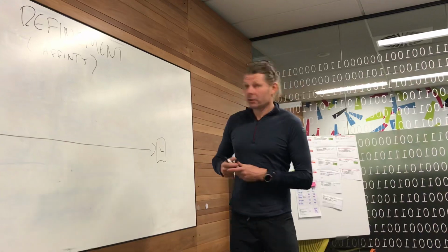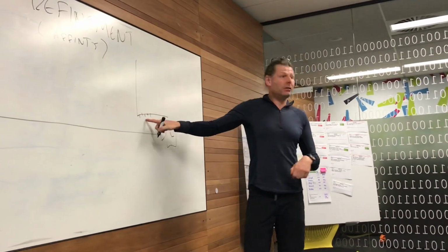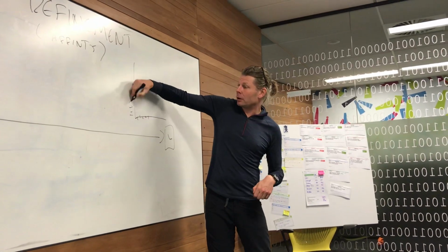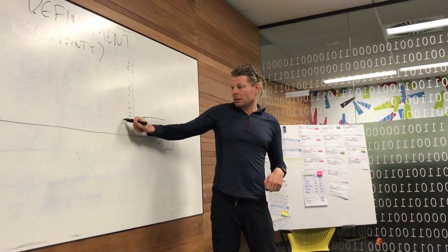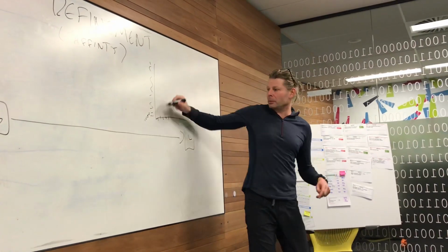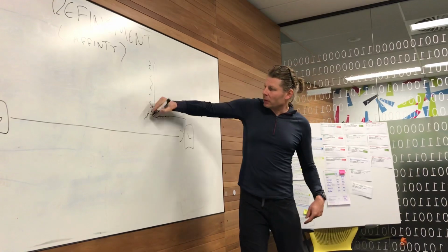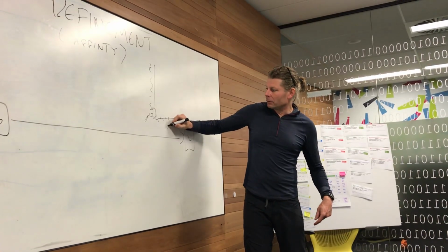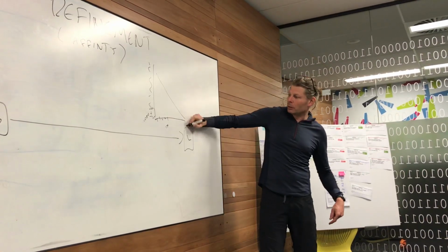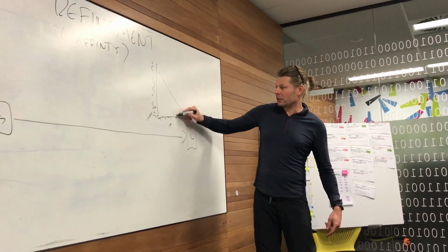And I did this once for ASB. We'd been going 5 sprints, so we had enough stories. We had a whole backlog here. Strangely, we got to exactly 1,000 points when we added them all up. Now, some down here were 40s and 30s, really big numbers. But 1,000 points, and we'd done like 150 so far, so we could tell you when we were going to finish. But that was no good because the bank wanted to finish then.